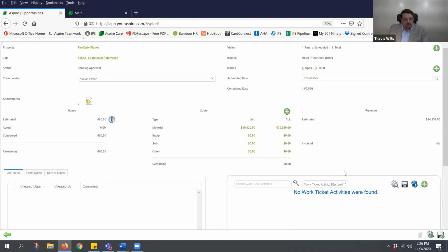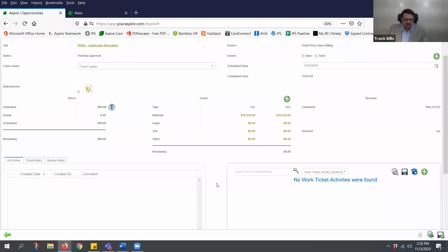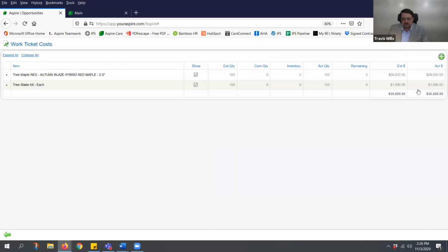Great explanation, Greg. Just one more area of clarity to answer another question that came up. Those items do not get costed into inventory, right? They're costed to that ticket as they are applied, so they never affect your actual inventory. They are only applied to the ticket unless, as Greg mentioned, it is an actual inventory item and you move those costs when you complete the ticket, any unused items into inventory. That's the only time your actual inventory is affected, right? So otherwise it just gets tracked to that ticket.